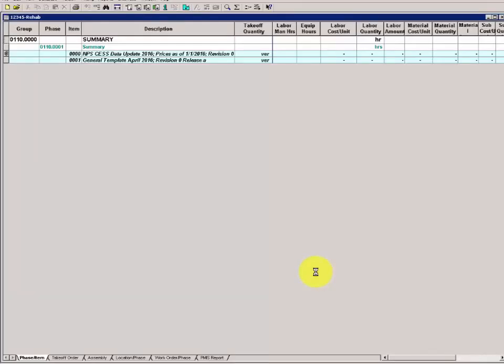The scenario is that you'll be doing a lot of roof replacement in your park, and your buildings have unique values that aren't available in the existing roof replacement assembly. So you will copy that assembly and add the additional work to the assembly unique to your park in this existing estimate. This one-time assembly will exist in this estimate only, but could later be copied to other estimates using the merge feature and reused again and again within your park.